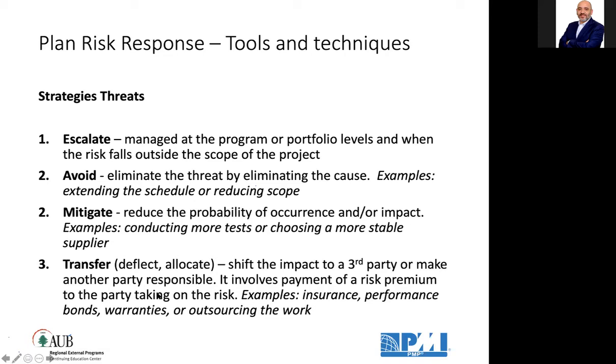Or I can mitigate by reducing the probability or the impact by wearing a helmet, by having a knee brace, or conducting more tests, or choosing a more stable supplier or an experienced consultant. I can transfer or deflect.